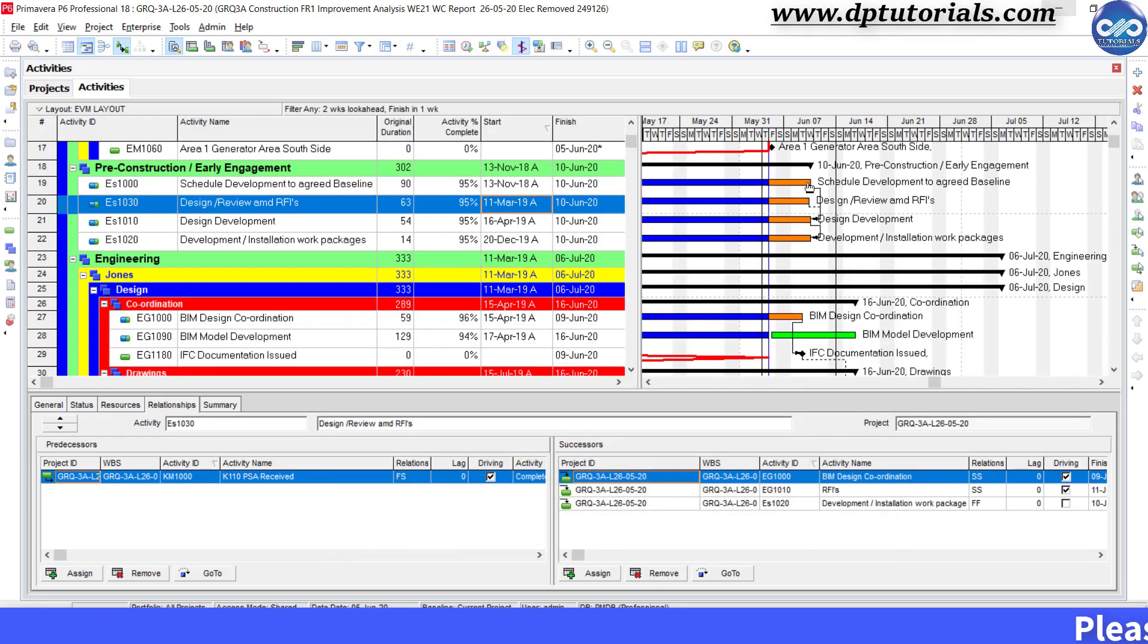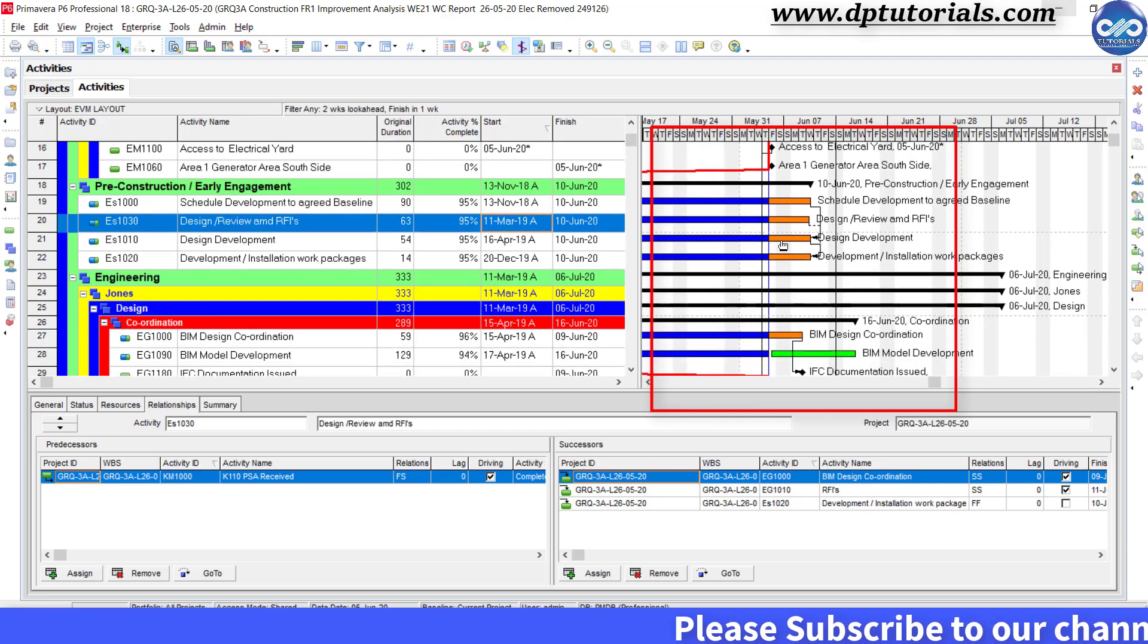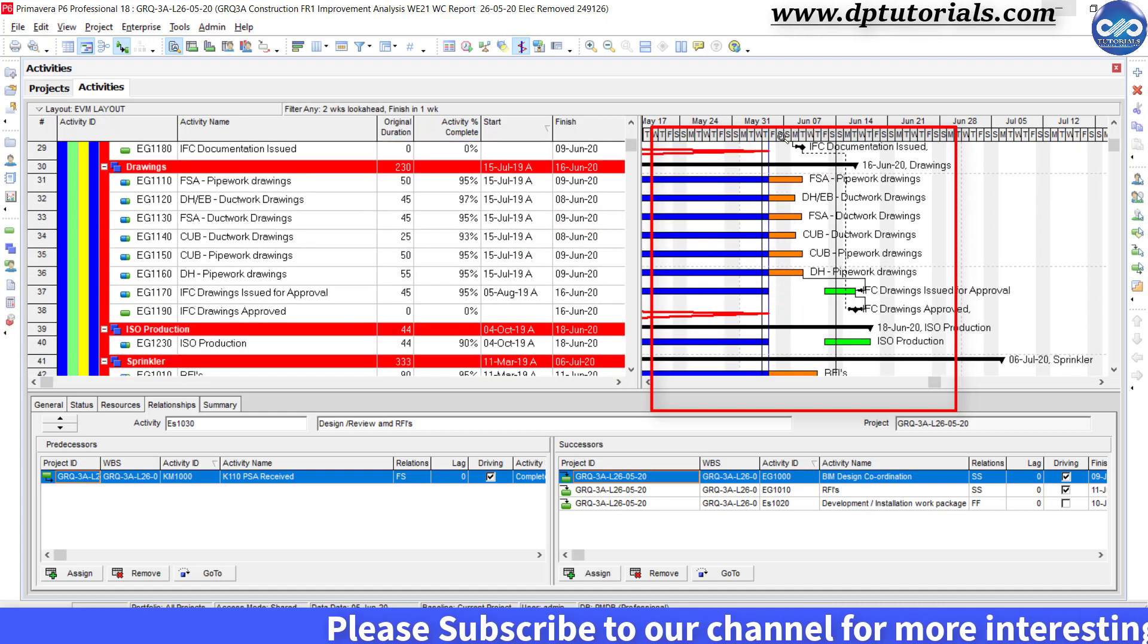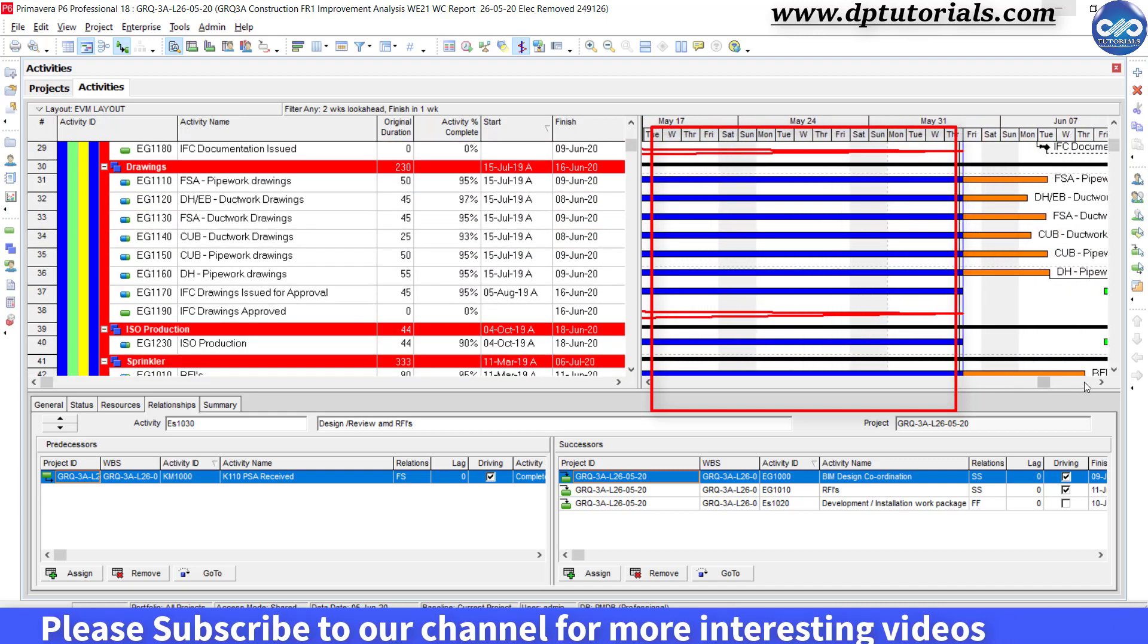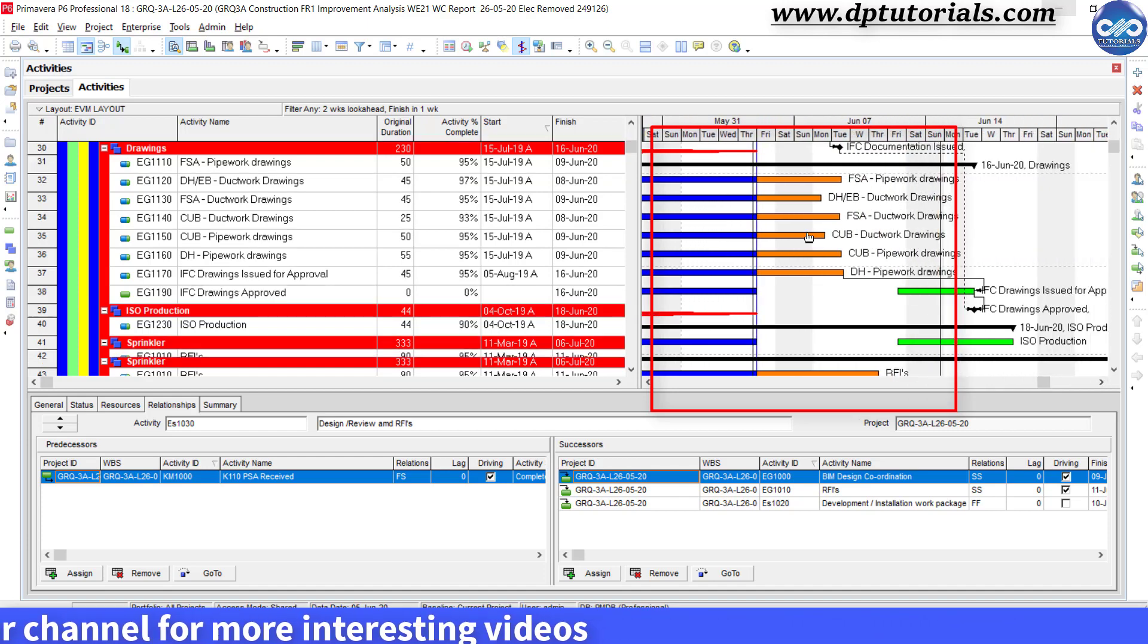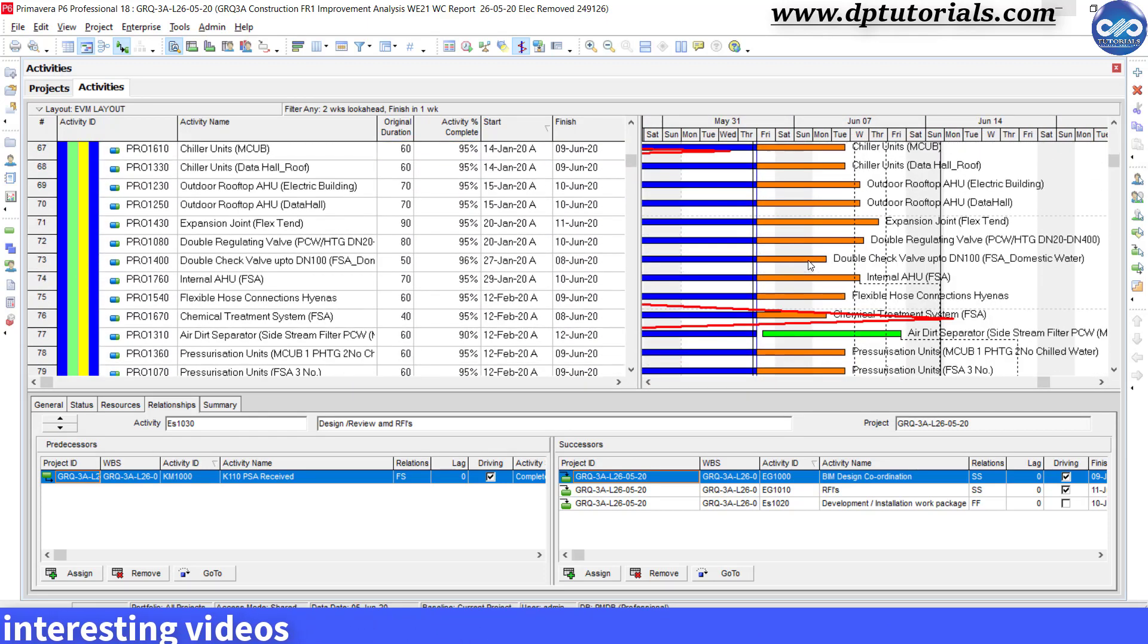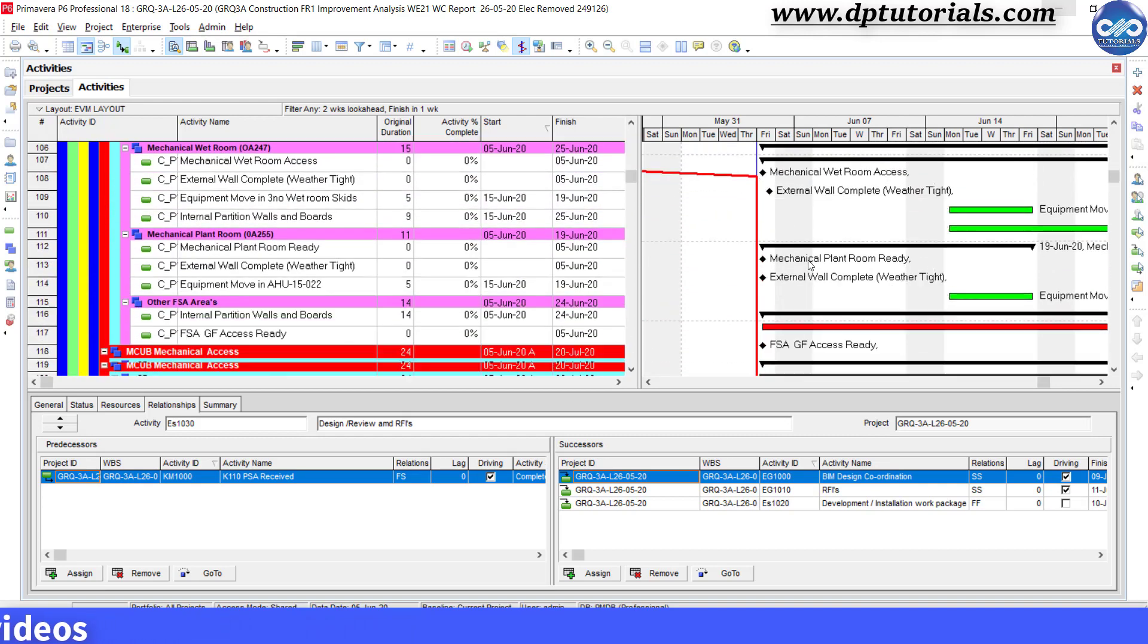Now you can see clearly with the highlighting in orange color in the Gantt chart for all those activities which are getting finished in one week time. If you want to have some milestones as well, you need to adjust similarly in the bars formatting section with some filters.